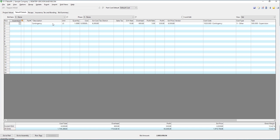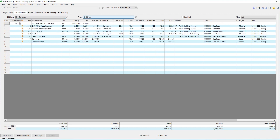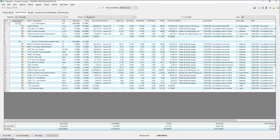When you open your takeoff, we will use what we call grids. A grid is simply all of the details for that bid item and phase. The bottom of this screen shows the totals for this grid for costs, overhead, and profit. We'll open the phase for building one and the bid item for concrete, where you then see all of the detailed estimating items brought in for this bid item and phase.